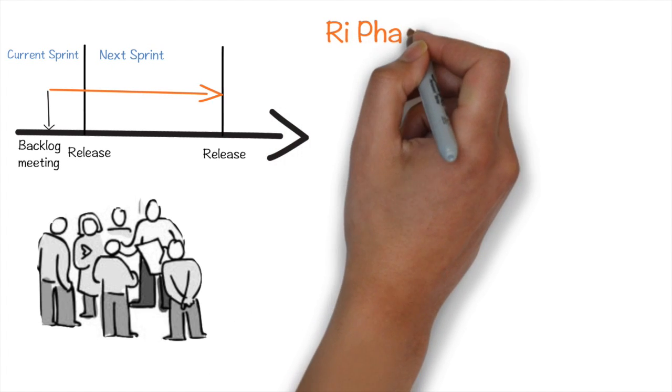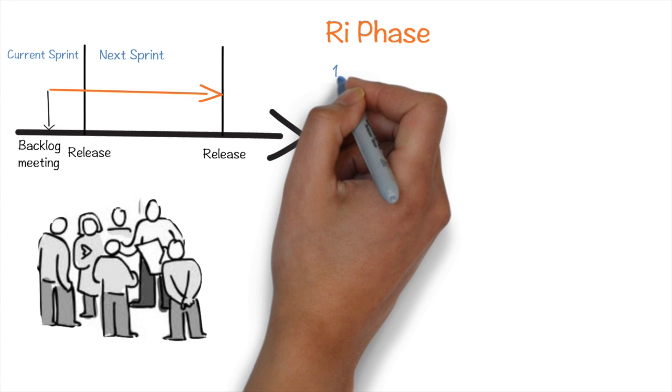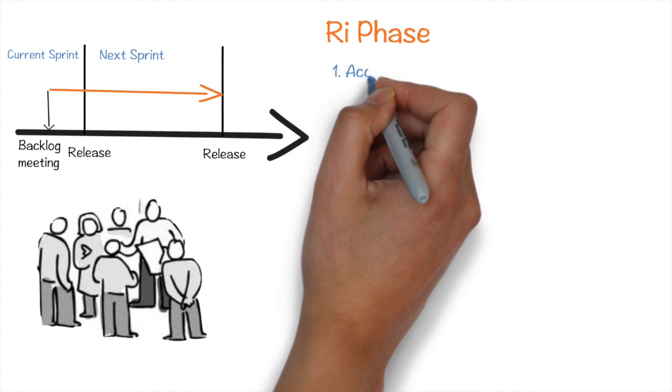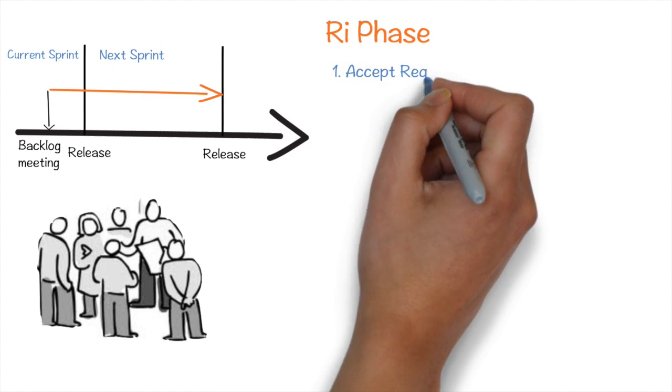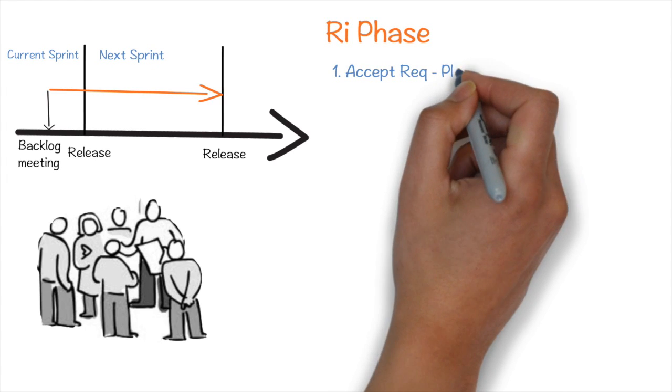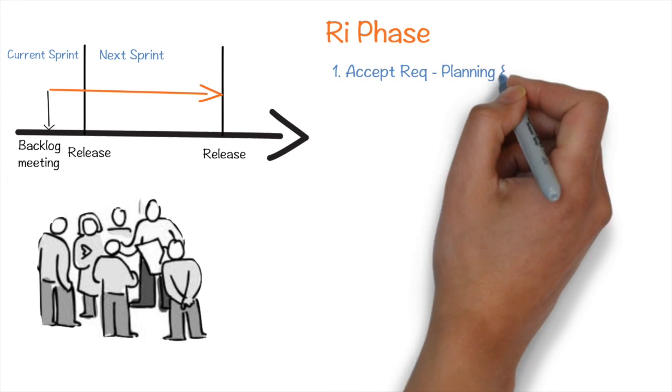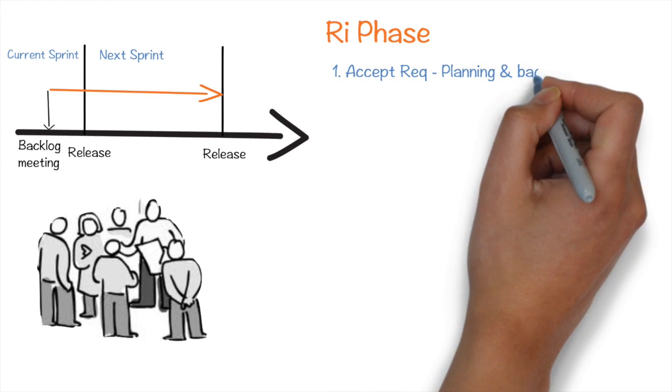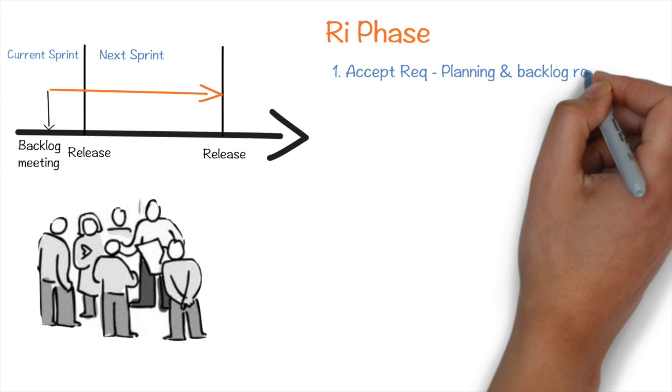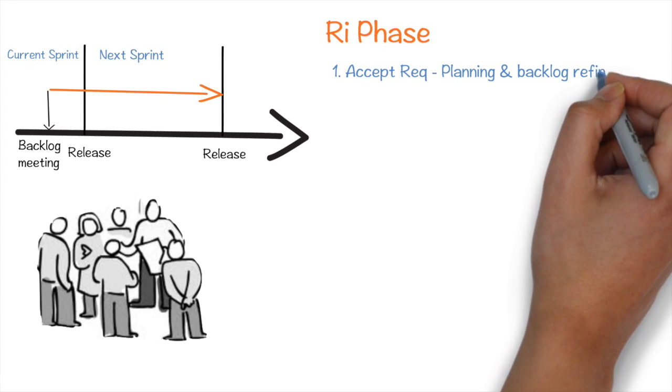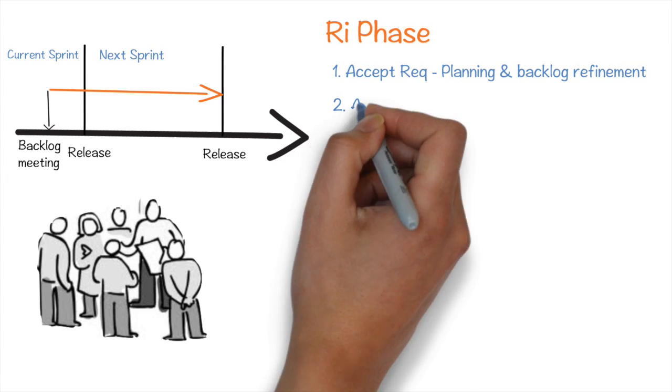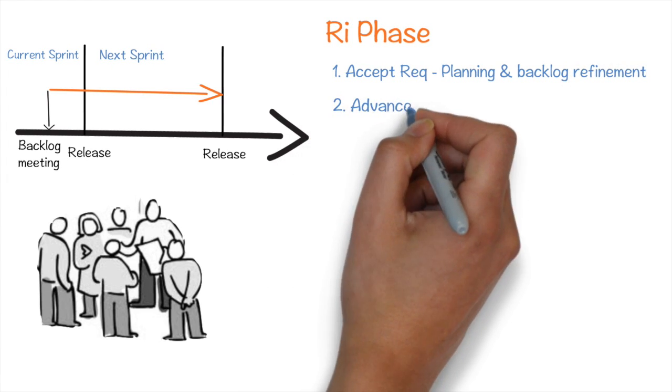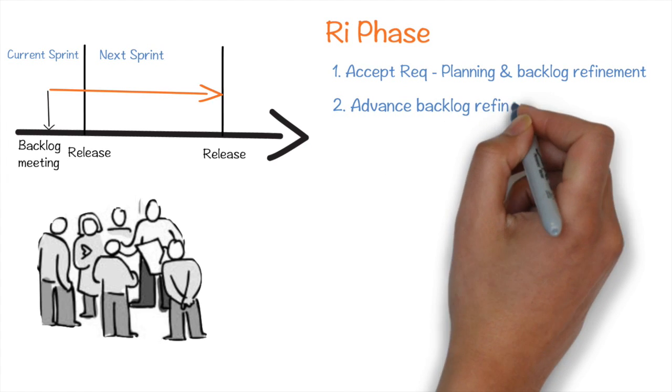So, in the Ri phase, Trade Bull team decided to have their own rules. One, they will accept requirement inputs from maintenance team in two phases for the running sprint: before sprint planning meeting and during backlog refinement. Two, to advance the backlog refinement meeting to the middle of their sprint.